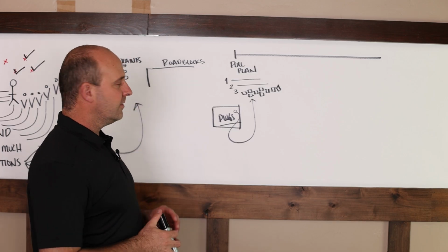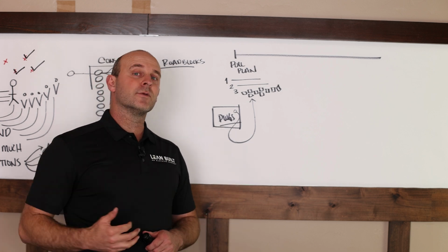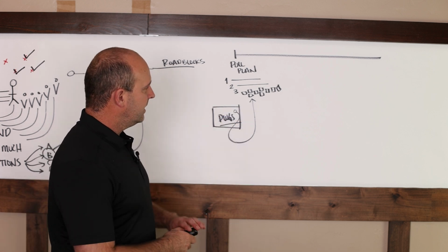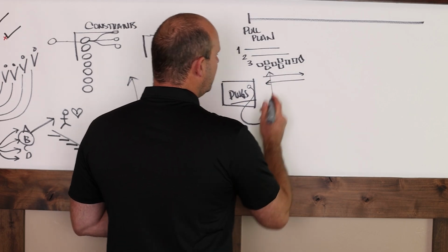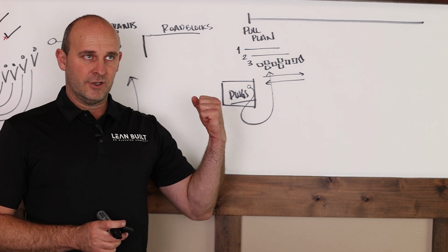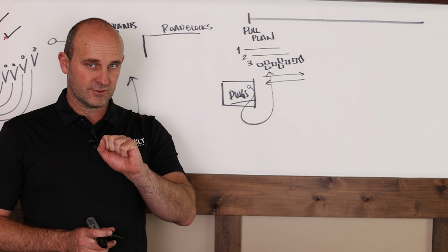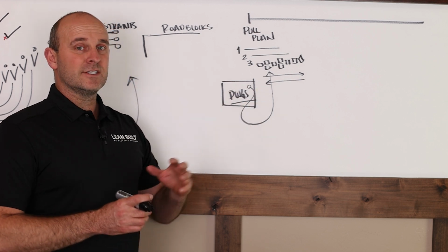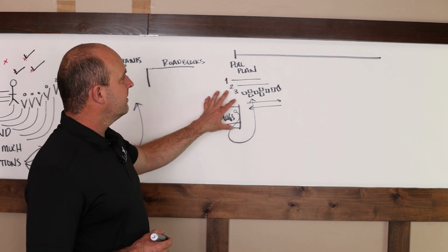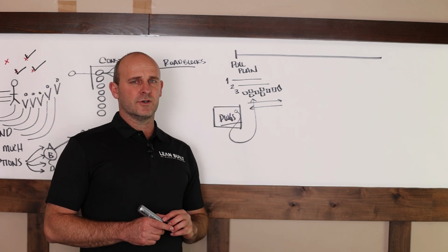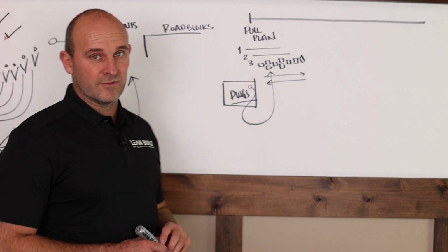So if you do a pull plan the right way, not only will the trades come prepared from reading the drawings and specs, but you and the pull plan can actually do a quick check to make sure that all of these components are here. Let's say you did this in the forward and in the reverse. If you go in the reverse and you literally make sure you have a sticky or a tag for every need or constraint or predecessor, then you'll actually start to find new tags and new stickies that you may have been missing. So the first time that you can really check to make sure that trades are installing per the plans and specs is legitimately the pull plan, because you're starting to reference the drawings.